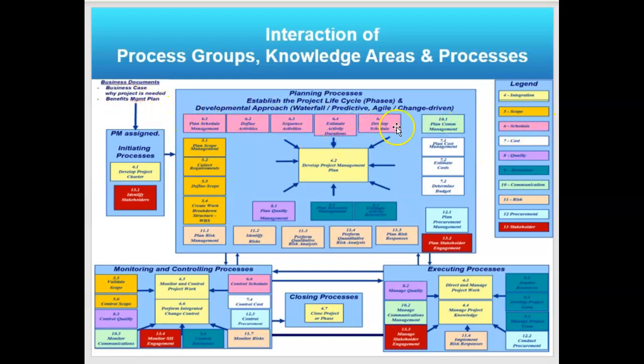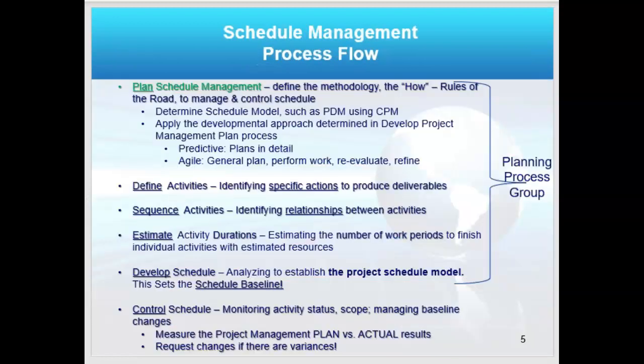And notice that schedule is only in planning and in the control process. So that's where we'll focus our attention for schedule management. Now, the processes are many. There's plan schedule management, which is your typical how you develop the methodology, the detailed approach for all the processes. Then you'll define the activities. Notice in scope, we called them work packages, right? Now, whenever you see the term activities, we are only in the schedule.